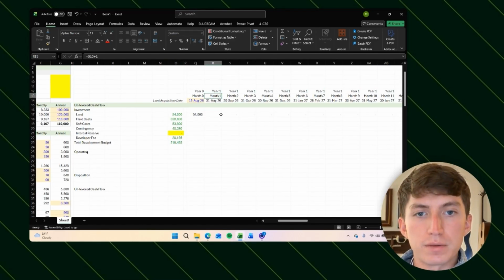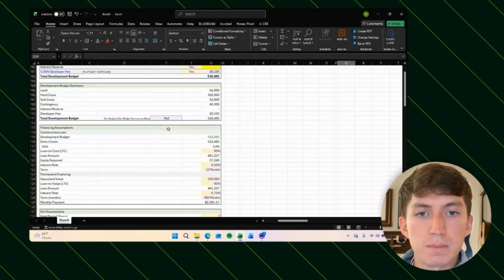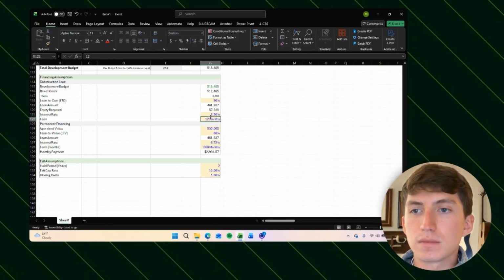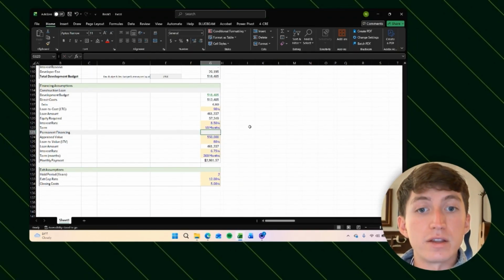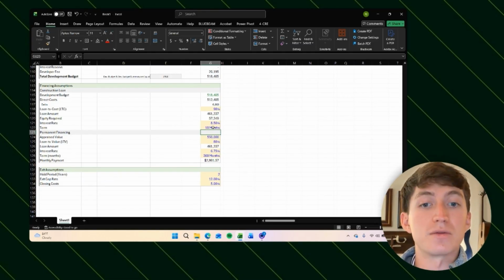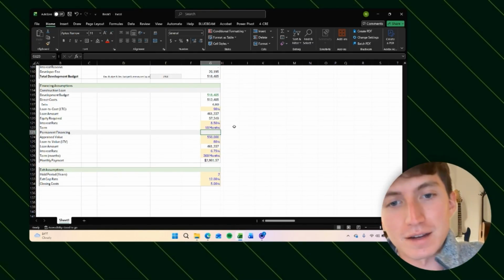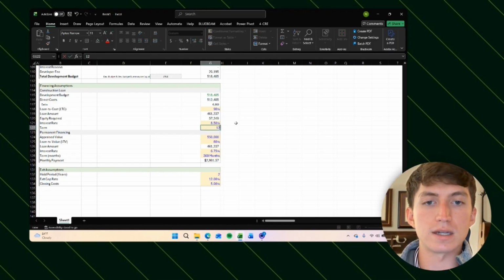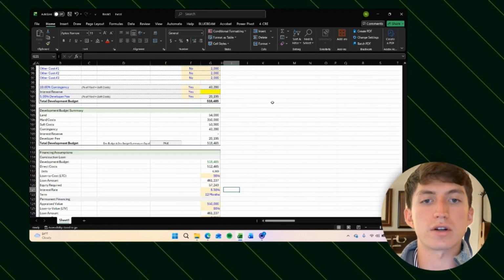start in month 1 and they end when construction is complete, which based on our input, we're going to assume will be at the end of 12 months because our construction loan is 12 months. If our construction loan was 18 months, then the conservative assumption would be to assume that construction took all 18 months. It'd be great if we could finish it in 6 months, but we're going to assume that it's going to take the entirety of the construction term.